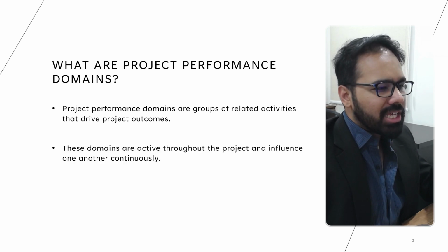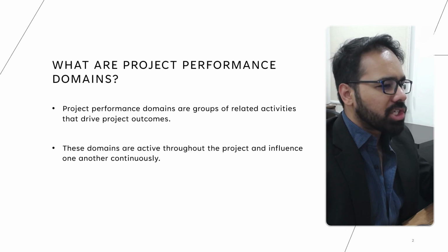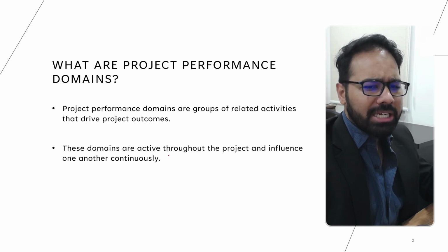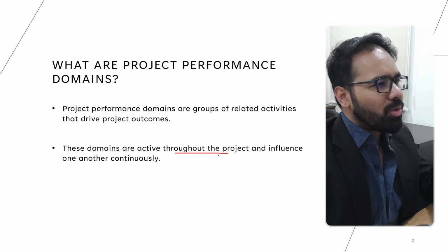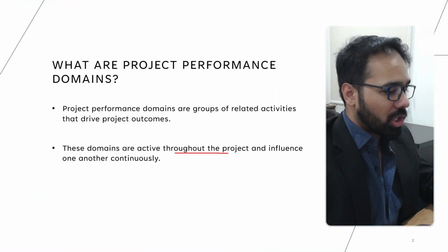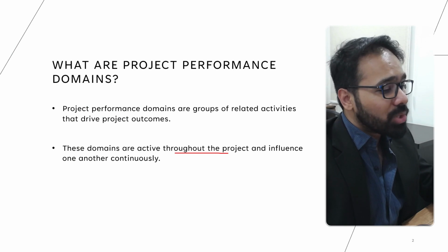Now, the other thing is these domains are active throughout the project and influence one another continuously. This is very important. These are active throughout the project. So it's not like one of them will get over and then you move on to the next domain, right? It's not a sequential step when we talk about these performance domains. All of these are active throughout your project. That means that all 8 of these, they never switch off.